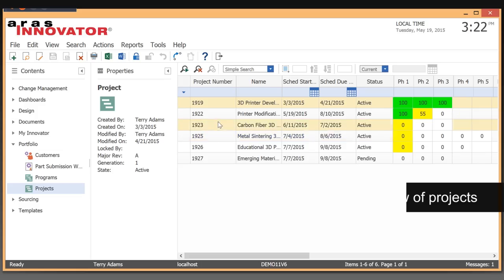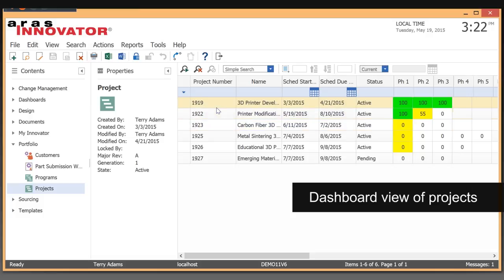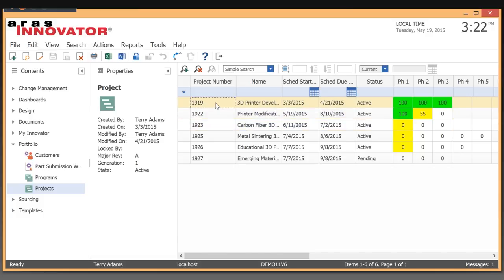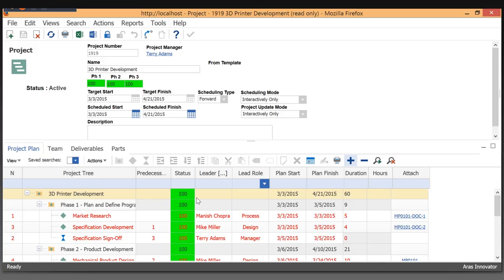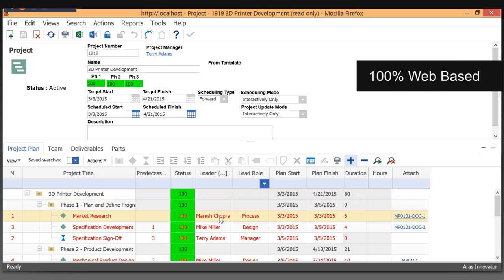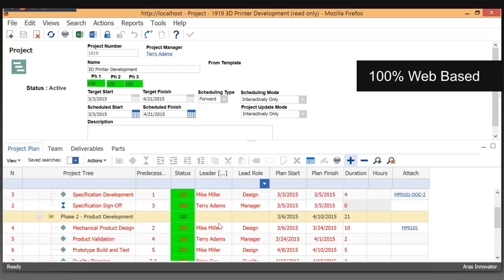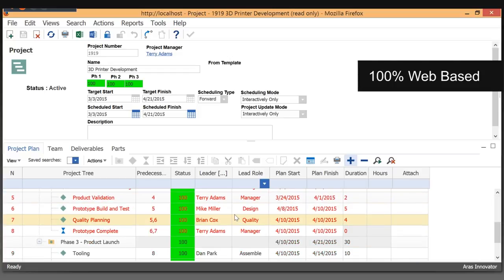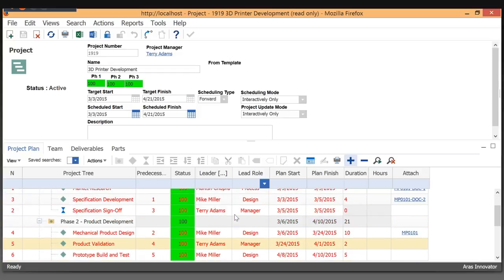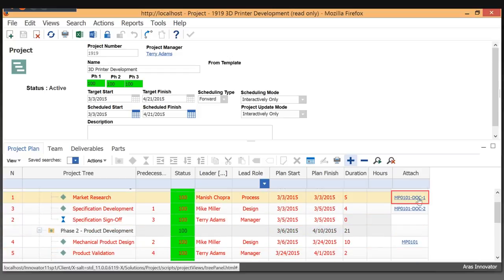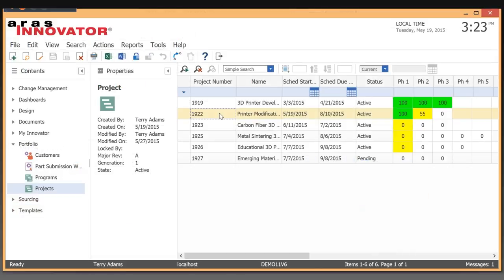ARIS Project Management was created using industry standard methods from PMI. Key information such as critical path and phase percent completed are calculated automatically.